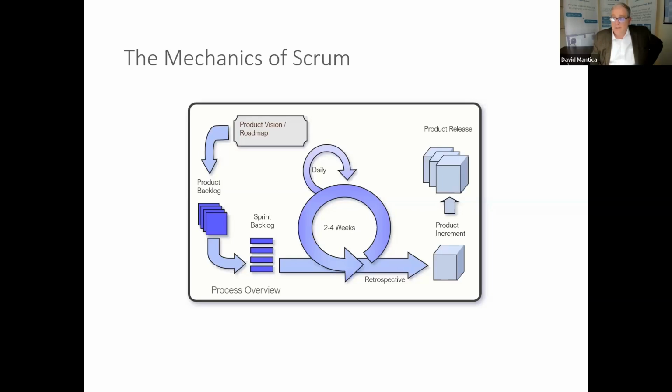What are some of the things that you're going to be working on in upcoming sprints? You're going to pull those in. Then you're going to actually create your sprint based on a number of user stories from that backlog. That sprint's going to be timed. We're going to do this in 4 weeks. We are going to meet daily to review where we're at within that scope that we boxed into 4 weeks. We're going to finish, and we're going to have an increment that someone can look at, touch, feel. They may go back and have new emergent requirements that we're going to add to either the sprint backlog or the product backlog. Then we're going to reevaluate for the next iteration plan based on where we see we're at.